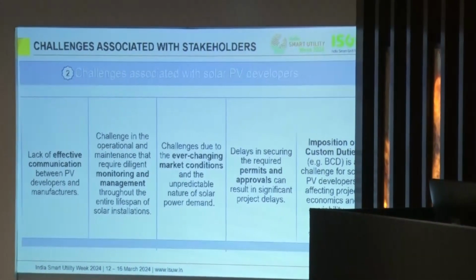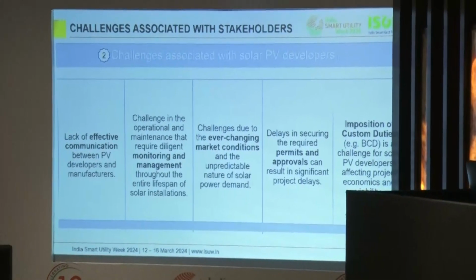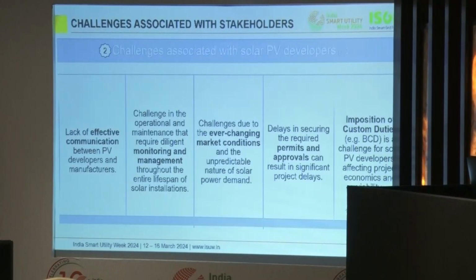And the fourth one is associated with government and regulatory bodies also, that is, delays in acquiring the required permits and approvals can result in significant project delays. And the imposition of customs duties also affects the solar PV developers, like the basic customs duty that has been implemented for solar PV panels in 2022. So you have to pay 40% extra for imported solar PV panels from international PV manufacturers.